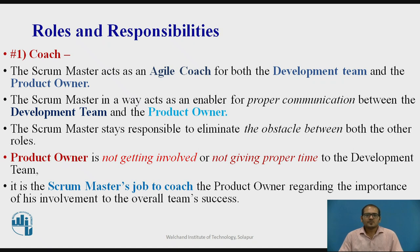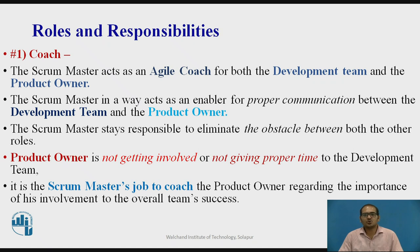Let us see the different roles and responsibilities of the Scrum Master. The Scrum Master acts as an Agile coach for both the development team and the Product Owner. He acts as an enabler for proper communication between the development team and the Product Owner. The Scrum Master is responsible for eliminating obstacles between both the other roles. If the Product Owner is not getting involved or not giving proper time to the development team, it is the Scrum Master's job to coach the Product Owner regarding the importance of his involvement to overall team success.